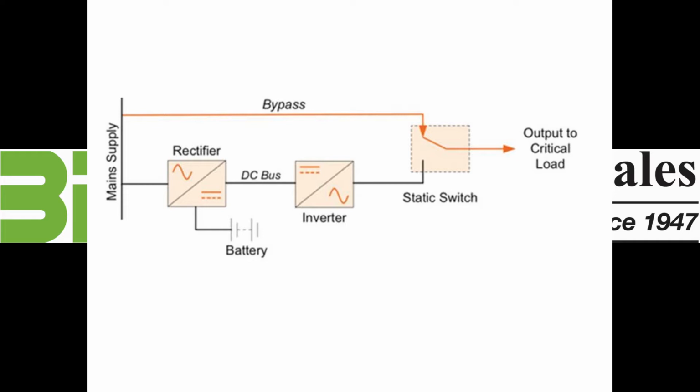Another lesson learned was making sure there's coordination with the UPS technicians. If a UPS is in bypass, then it is seeing raw power and not going through the UPS. If there is a momentary power outage, the load loses power.